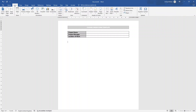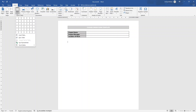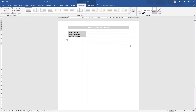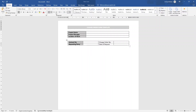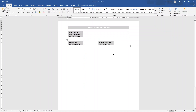The next one is going to be more about the contract or the change order number, so we're just going to give the ability to store that in this document. We're going to create a four by two table. In here, we're going to put contract number, change order number, the requesting party, and also the ability to store the date of the request. I'm going to hit Home, bold, and apply that gray. You can see the content area to enter this information. Just play around with the column widths so it all lines up and looks more professional and neat.